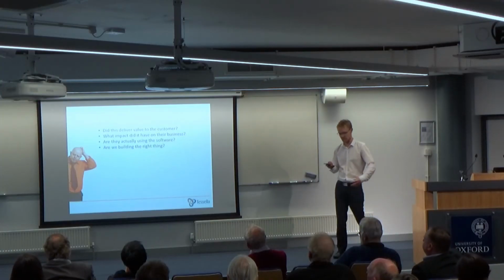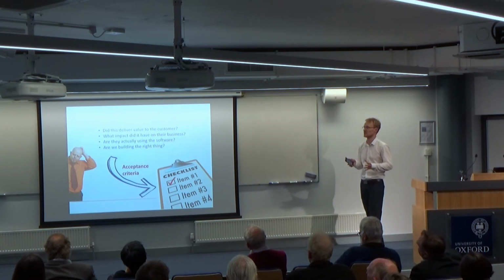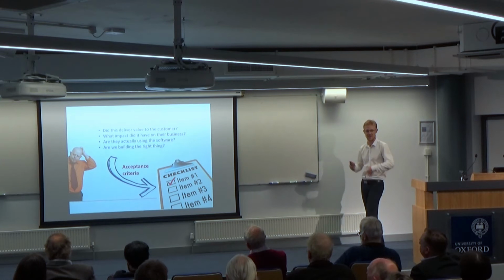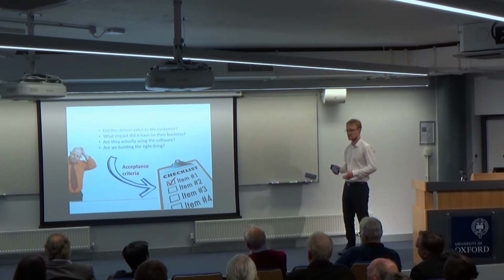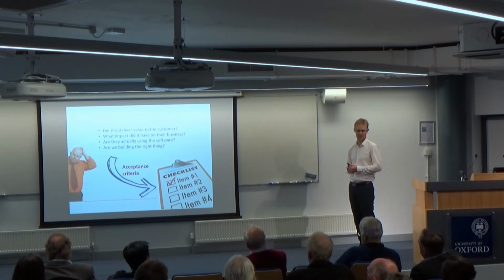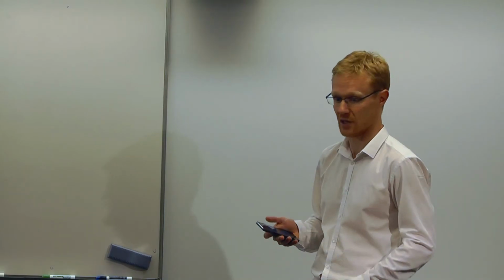If you remember those questions that we need to be asking ourselves, this actually should be part of what we call acceptance criteria for when we deliver a feature. When the development team says, "Here, I think I'm done," well, are you really done? Did you check what impact it has on the customer? Did you ask them? Are they using it? That kind of question. How do you know this was the right thing to build? Have we learned that through the process?